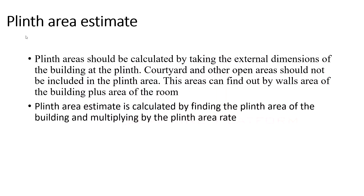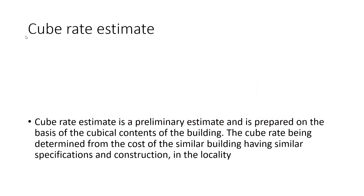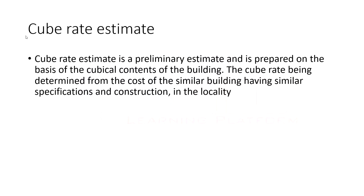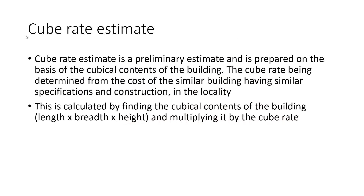The cube rate estimate is a preliminary estimate prepared on the basis of the cubical content of the building. The cube rate is determined from the cost of a similar building having similar specifications and construction in the locality. It is calculated by finding the cubical content — length × breadth × height — and multiplying by the cube rate.